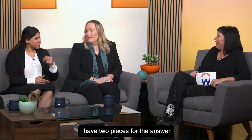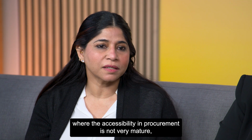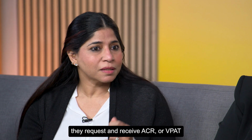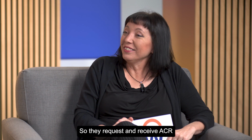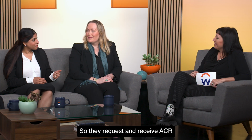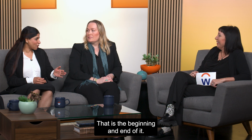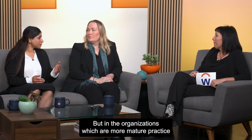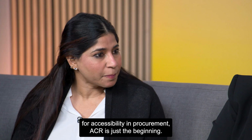So I have two pieces for the answer. So the first piece is, in an organization where accessibility in procurement is not very mature, they request and receive an ACR, or VPAT as they call it. So they request or receive the ACR, and that is the beginning and end of it. Okay. But in the organizations which have a more mature practice for accessibility in procurement, ACR is just the beginning.